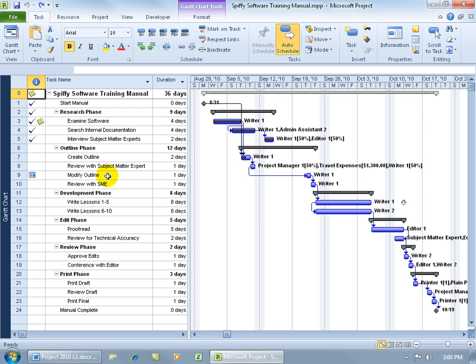Actually, you can split any task. It doesn't have to be completed. You can even split those that haven't even started yet, as you can see these tasks over my Gantt chart haven't started.